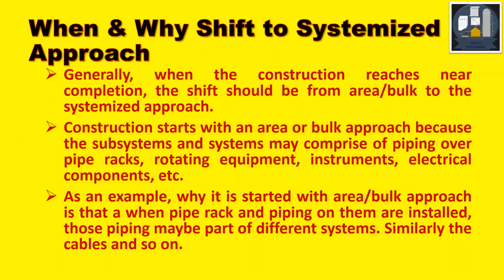Then one question is when and why to shift to systemized approach. The first answer is when. Generally, when the construction reaches near completion, the shift should be from area or bulk to the systemized approach.